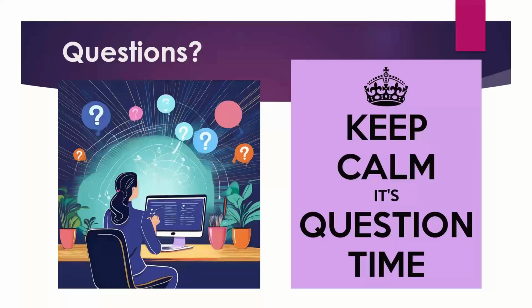I'm telling the system that my standard working times are, in this case, Monday to Thursday, 9 till 6. I can't go in and say that I have every second Friday off, or I don't work the last Friday of the month. You'd have to go in there and set up the non-working activities to cover those extra periods that you're out. But no, sadly at the moment, you can't set recurring.